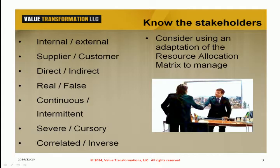A stakeholder can be internal to the company or an external position. Some may appear to be stakeholders, but upon careful review are perhaps well-meaning bystanders or worse. Many of these stakeholder issues will be under the auspices of the project manager. However, there is no doubt that these interfaces — shared boundaries and inputs, suggestions, comments, advice, directives, and instructions — will come to have an impact on test planning, testing, and fault reporting. When it comes to assessing competing stakeholder demands, it is possible to use a resource allocation matrix to identify the stakeholder's area of input. This will help clarify whose voice should carry the most weight per specific topic or requirement.